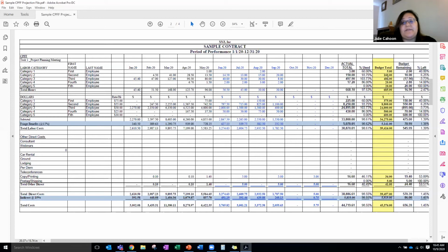It's helpful to keep those kinds of realities in mind, that 17.9 hours is actually 2 days of work. That's quite a bit of work. What is it? Is there something unexpected happening? Is it a potential risk? Do you need to talk about it as a team? That's what this type of document will help you do, flag any potential risks. Seeing that overage in time will help guide you through the management.